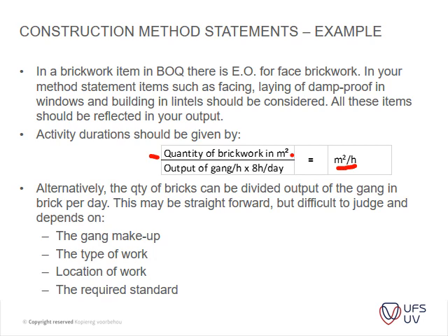You guys understand that? The one just relates easier to the BOQ, where the other one is more to your material and labor. So you have to do your material and labor one because that's the most accurate one, but then you can take it further to actually your square meter per day. Okay.